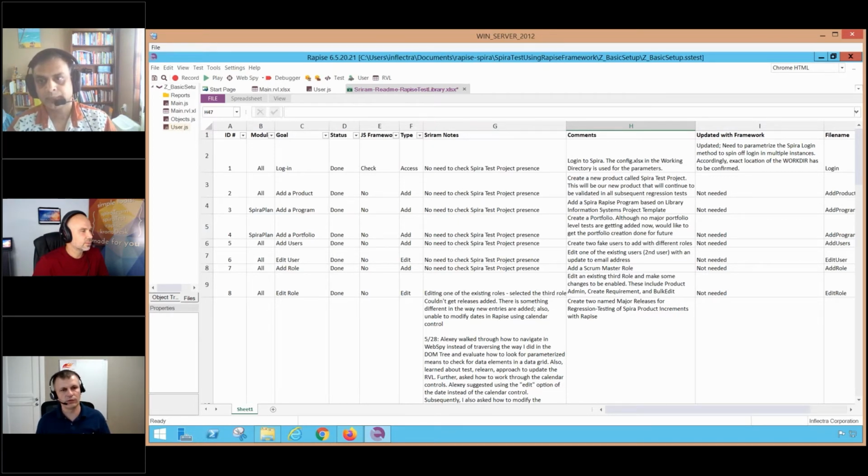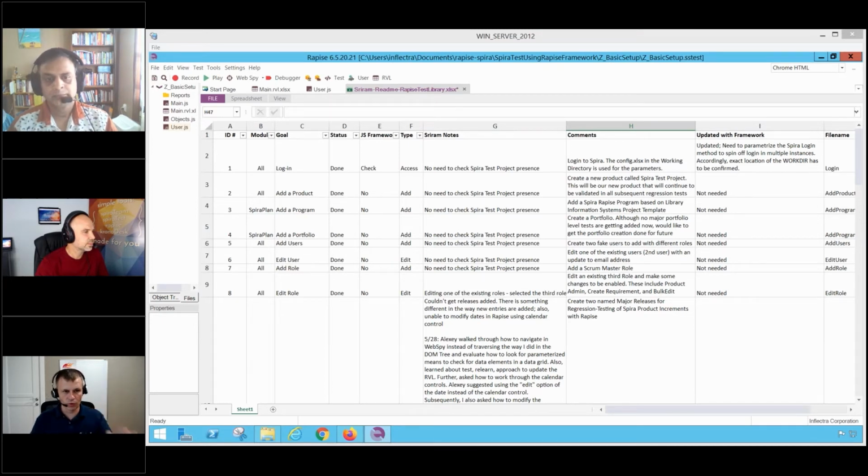So it's more effective if you see that something is not working end to end, leave it working somehow or skip it for now and proceed working on another scenario, because very similar scenarios may be very different from the automation point of view, and while one is easily automatable, another is a total dead end. And if you just focus on it, you will lose a lot of time. So the right approach is to work on many things in parallel. In this case, you don't get stuck and you don't lose too much time. This was my comment here.